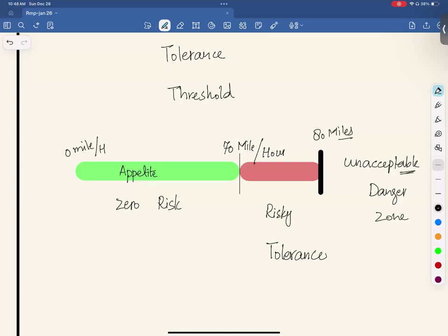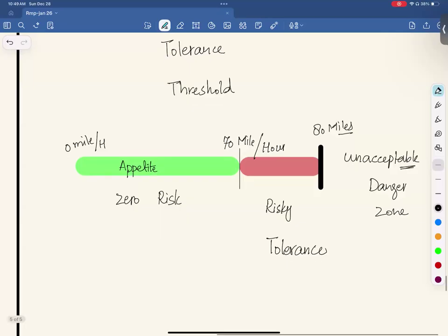We need to understand the risk appetite of our stakeholder, what the red zone is for them, how much loss they can bear, how much experimentation we can do, and how much reserves they're capable of investing in the project if something goes wrong. So this is a discussion about risk threshold, appetite, and tolerance, and we document this in the risk management plan. Before you identify risk and before you do something, you document the risk appetite of your stakeholder. You understand, everybody? Any confusion about it? Then we jump to risk categories.